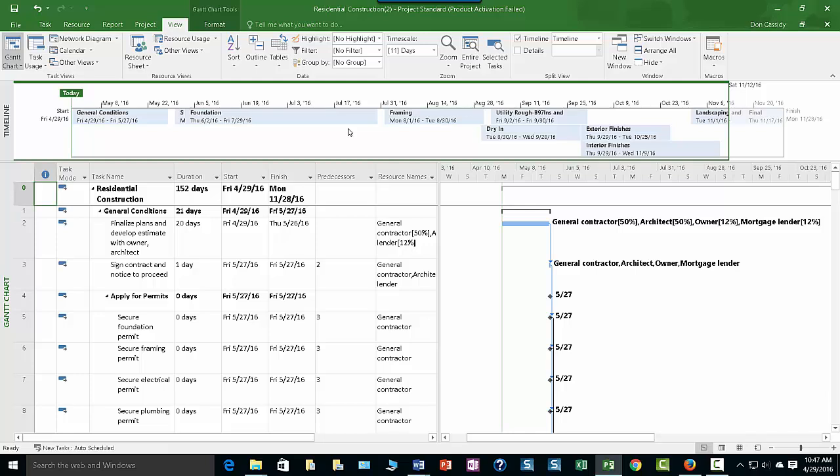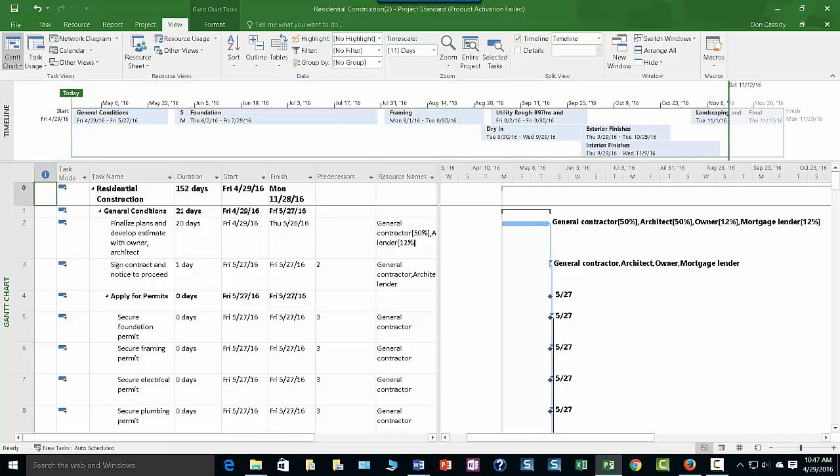So let's just think through this. The idea of a critical path is that all the tasks on it must be completed without delay. Or if you delay any of the tasks on the critical path, the project's going to take longer. That's the essence of it. It's not any more than that. So it's critical because if this gets delayed, messed up, whatever, the project's going to suffer.